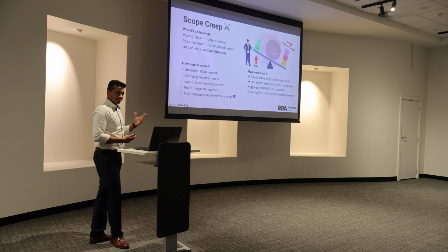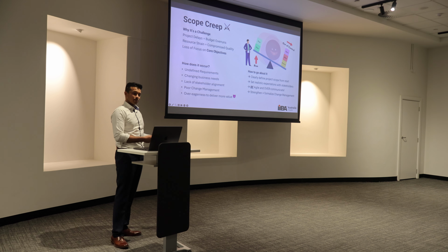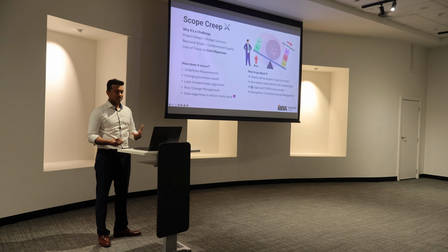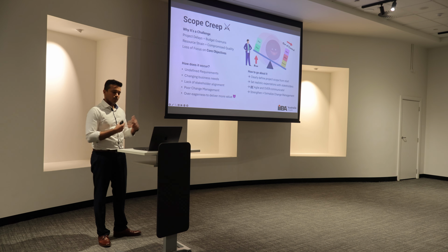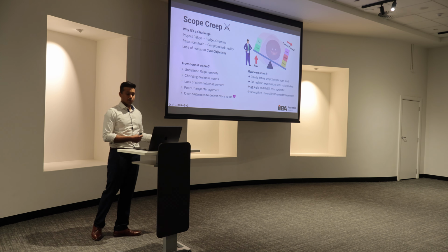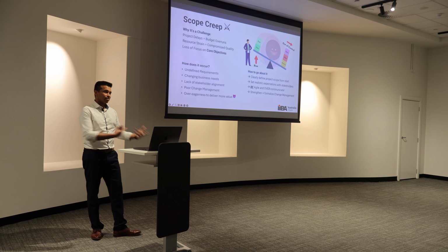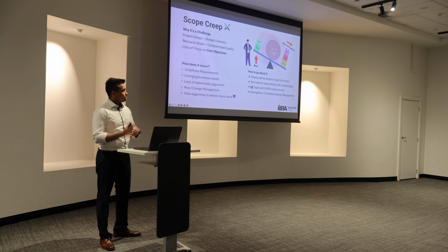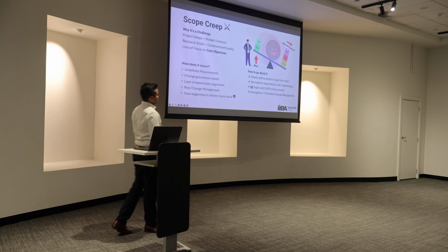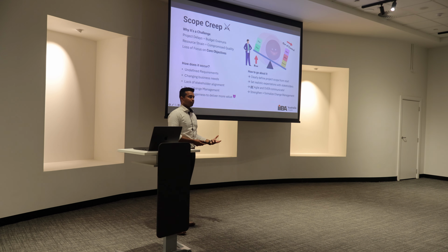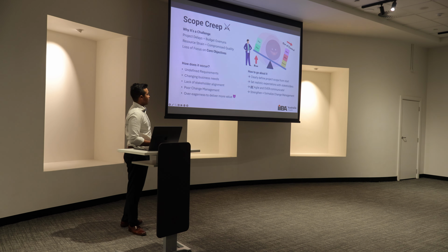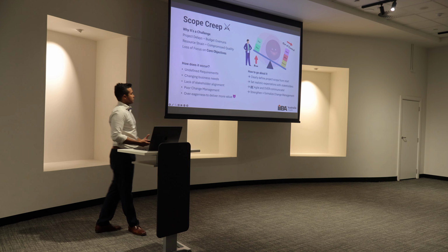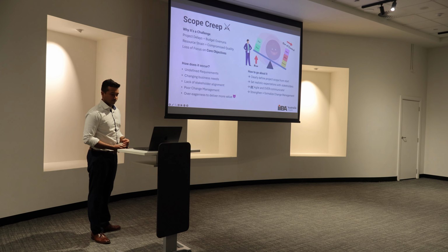Change management, if it's not there, you could start by formalizing a change management process, templates and entry criteria. It's all there in the bubble. Google it up, ChatGPT, whatever helps. Work with your change manager or the corporate communication people to help articulate what's changing for them. And help them assess that impact, because they might not be as close as you are as a BA or as someone who is technical, someone who is helping the business on an operational basis even, to understand what the change is. So that clear communication is very important as well.